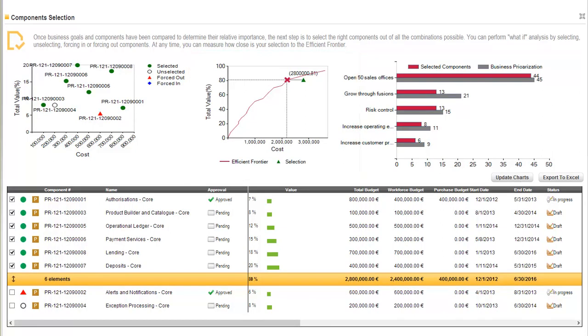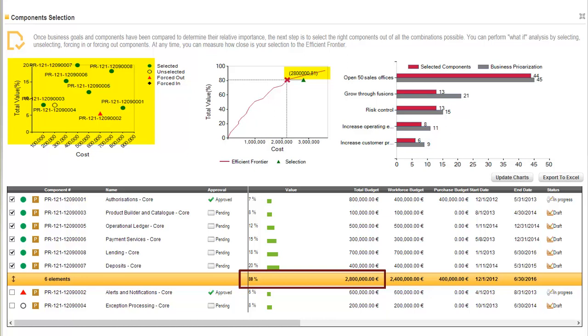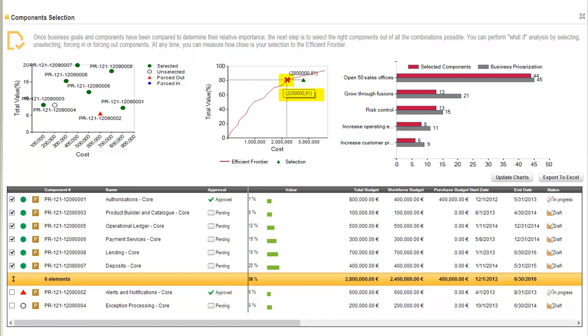In this case, we can see that the current selection of projects provides a value of 81% at a cost of $2,800,000. But ITM Platform shows us that there is a combination of projects that would provide the same value at a lower cost.